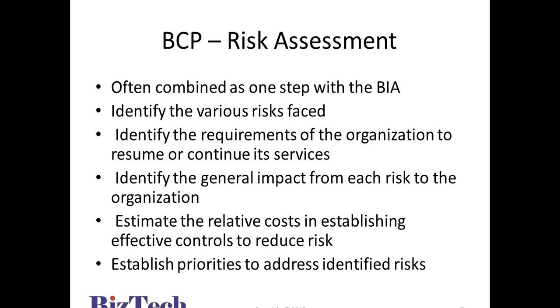What are the costs to put in a control? If the cost is too high compared to the risk, it doesn't make sense to put in a control that's so costly that the cost is more than the impact the risk would cause. If that's the case, we just accept the risk because putting in controls is too expensive, or sometimes we put in alternate controls.